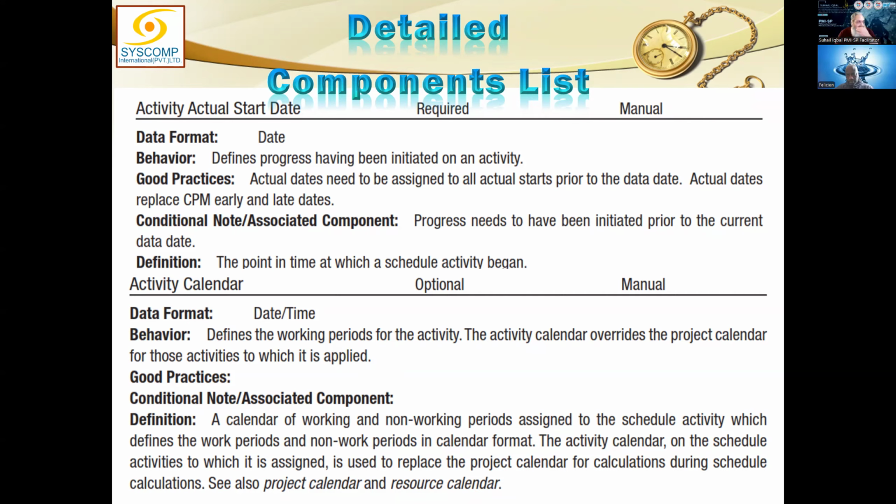For example, if there is a chemical test going on and we have taken the sample in duty hours, it might be processed for the next 24 hours, right? So it doesn't go by the rules of the project calendar. For this, we have to take how much calendar time has been allocated to this activity, whether that is according to the project calendar or not. But generally, we take care that it is aligned somehow with the project calendar.